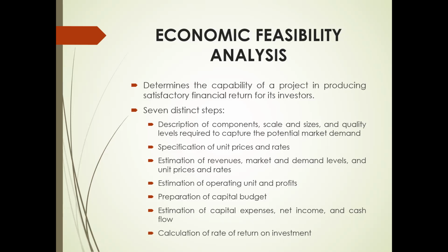There are actually other expenses that the project will encounter, and these are all related to the capital investment in the development. So to estimate these expenses, a capital budget should be prepared first. A capital budget is a detailed itemized budget of the capital investment required by the project. In the case of a tourism project, this will normally include building construction costs, professional fees, infrastructure costs, recreational facility costs, furniture, fixture, and equipment costs, contingencies, and the like.